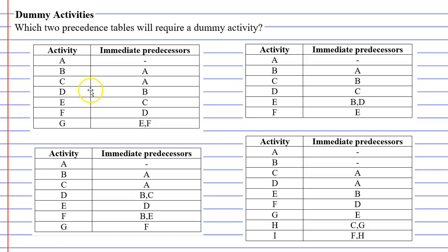Alright, the solutions are the table here on the top right and the table here at the bottom left. Why is that? Well, for the one at top right, if we look at activities C and E, you'll notice that they both share an immediate predecessor. They share the immediate predecessor B. And there's also an immediate predecessor that they don't share. They do not share the immediate predecessor D.